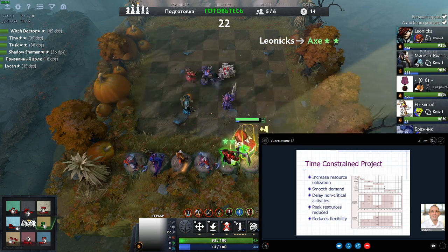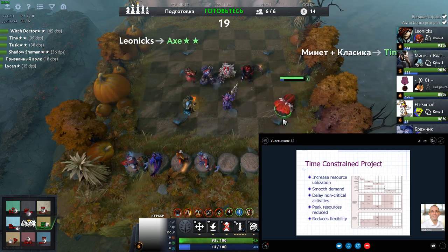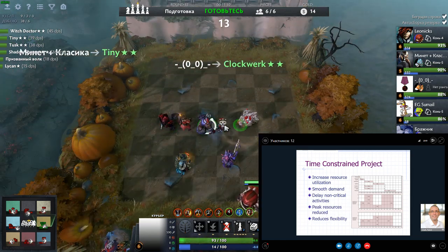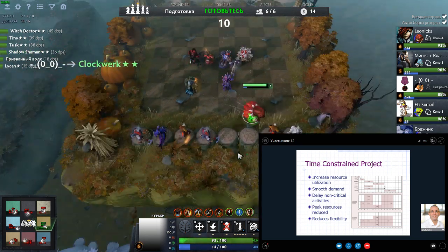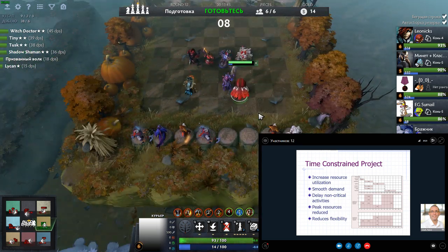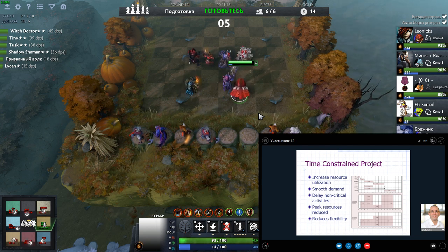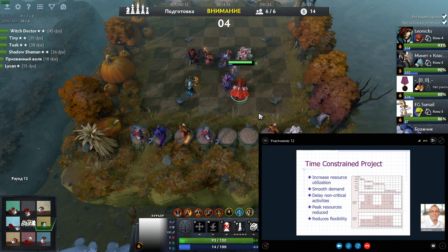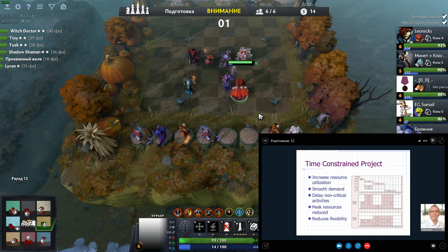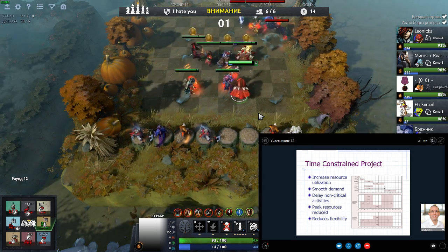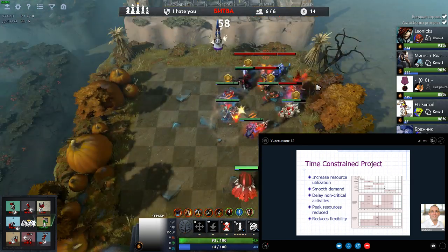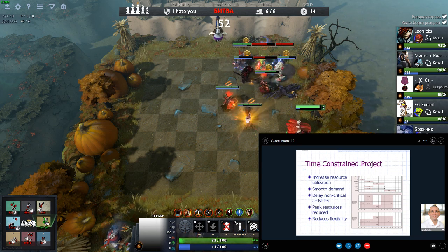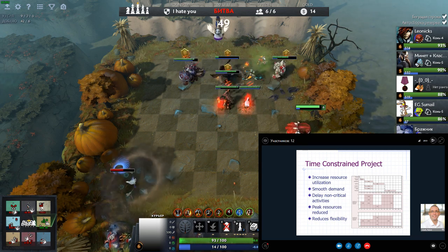There are two types of project that we tend to think about: those that are time constrained and those that are resource constrained. If they're time constrained, we might have peaks and troughs in resourcing, so what we have to do is work to try and smooth the demand out. So we don't have a representation such as the middle graph in the graphic you've got in front of you, but something more like the one at the bottom. What we've done there is move some work around, because we have to get it done in a period of time, so we've used the resources as widely as we possibly can, and it may mean that we need to take on a little bit more resource.